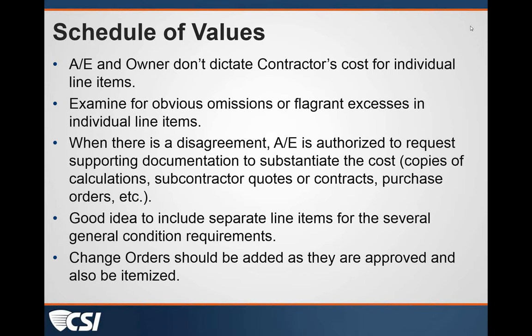So when there is a disagreement, you can request supporting documentation, that's in the general conditions, to substantiate the cost that he is claiming on his schedule of values, be that his subs' quotes, contracts that he's got with the subs and material suppliers, his bid forms that he used to put his bid together. The general conditions allow you to ask for that information so you can make sure that that schedule of values is accurate.